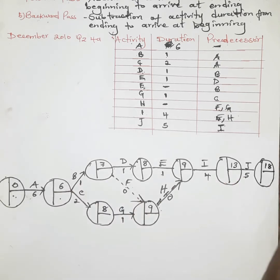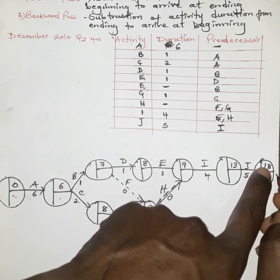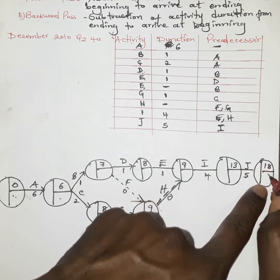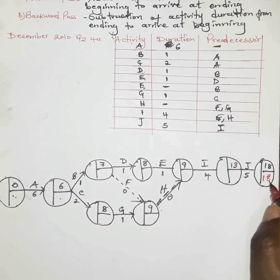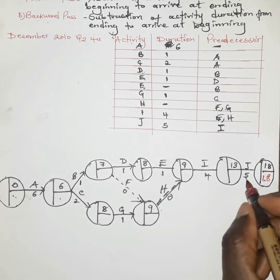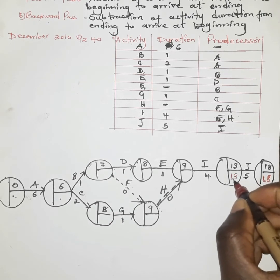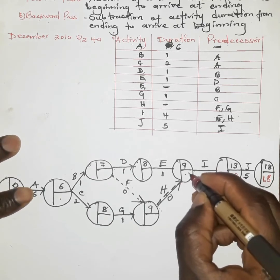That is what is known as the forward pass. Now for the backward pass, we talk about subtraction. The latest completion time, which equals the earliest finishing time, is eighteen weeks. After which we subtract the duration to get thirteen. Then to get the next node, we subtract four from thirteen to get nine.